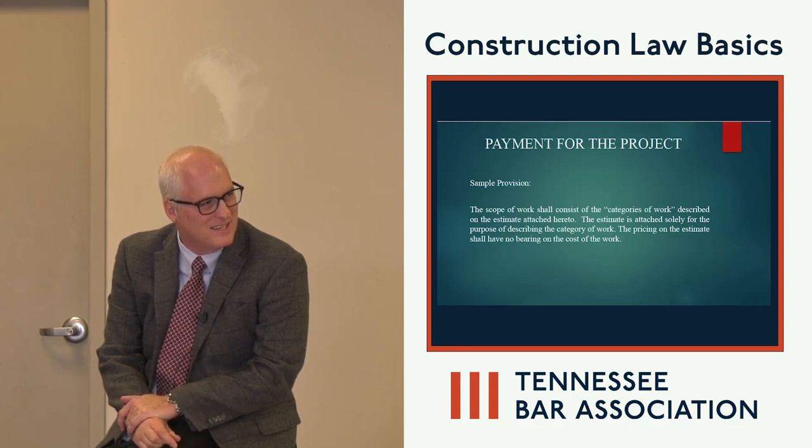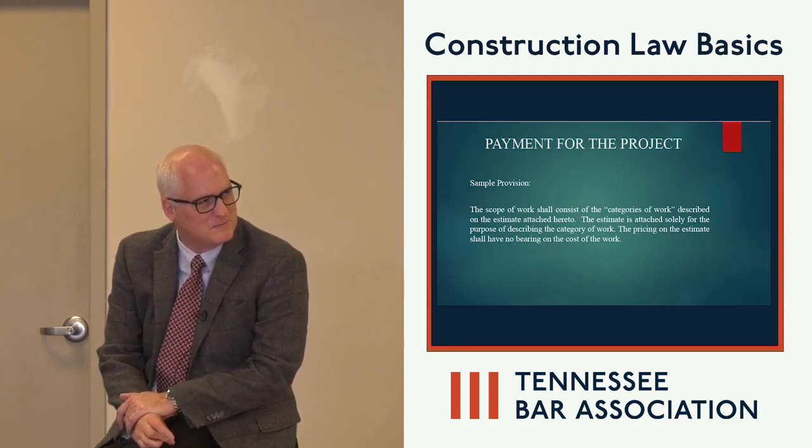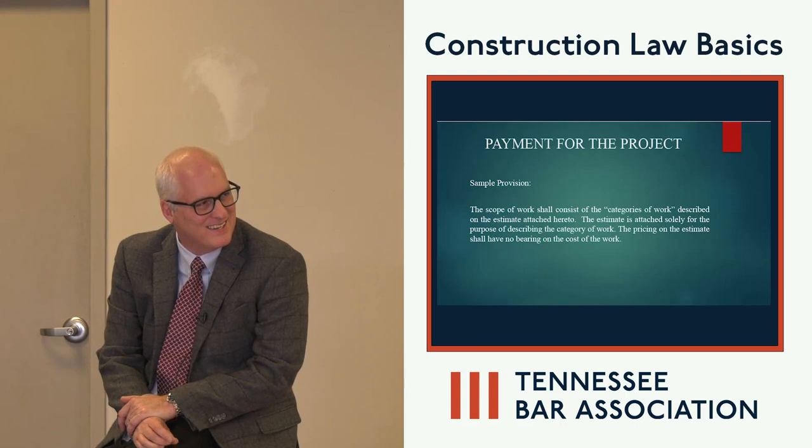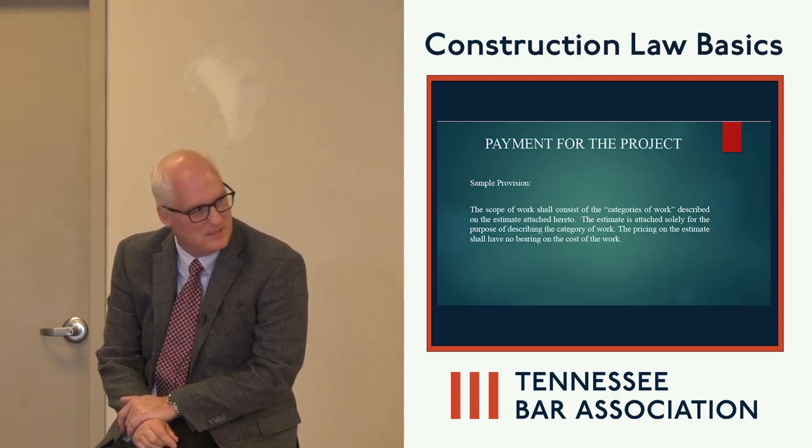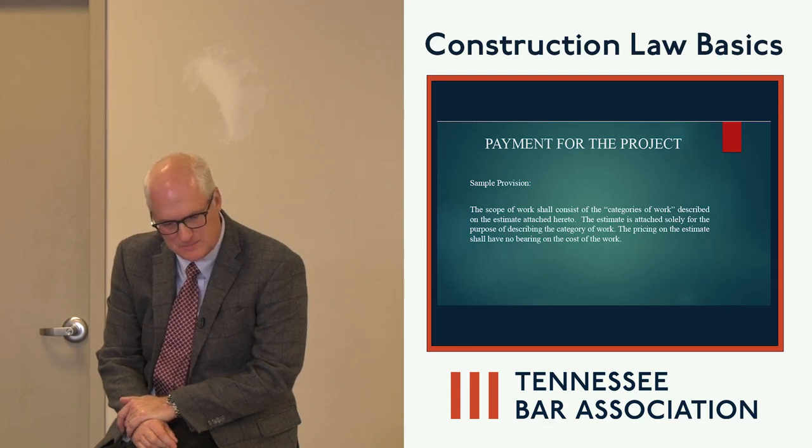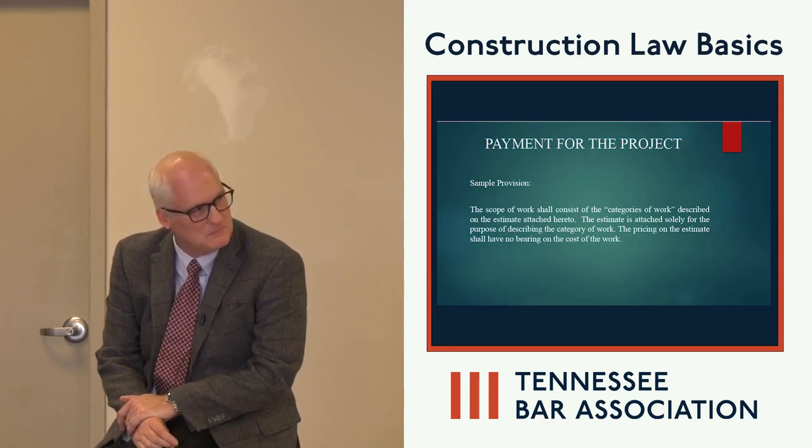And then you've got this budget of $12,000, and these materials and everything and all that stuff. And so they'll start talking about how they're having trouble sticking to the contract price for this category of work. So after they spend long enough calling it the contract price and showing actions that reflect it being a contract price, the judge has no problem holding them to that, because these guys are drafting the contracts, right?